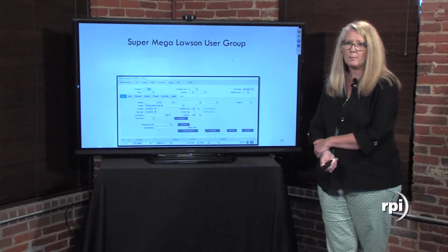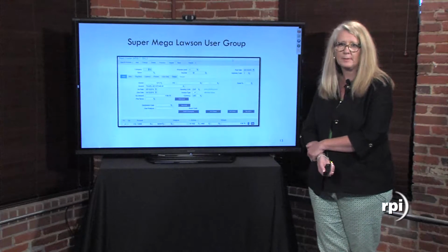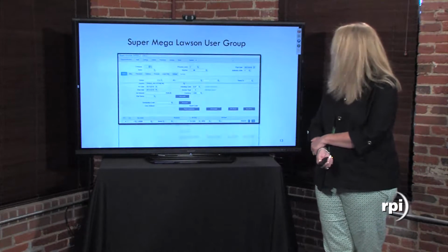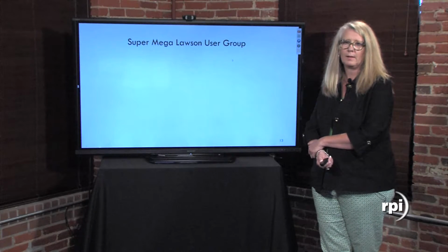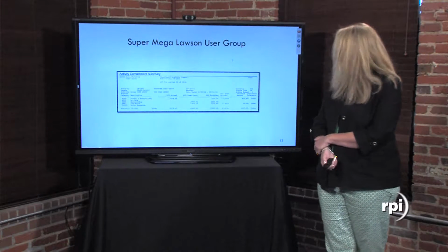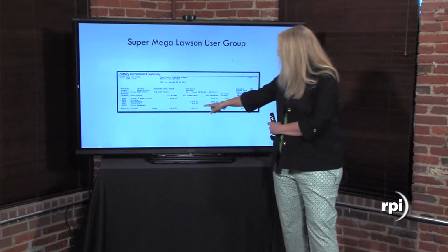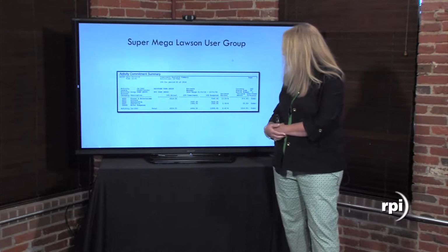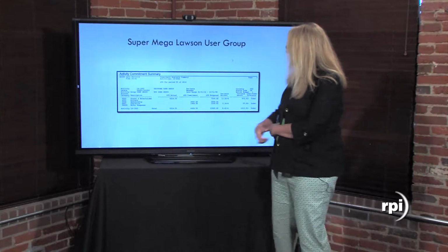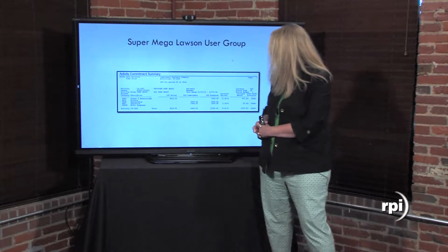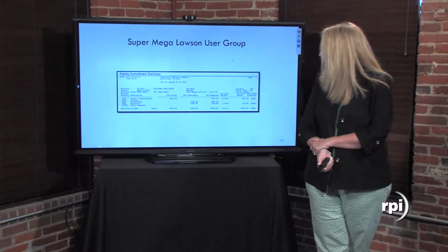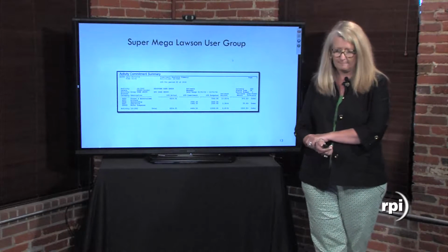Now I have some travel invoices flowing through. There's quite a few of those going to come through. Now I can see my AC 295 report, and I can see I still have my commitments here from the $3,000 and the $1,464, and now I have an actual of $6,524.55 for those invoices that I actually paid.